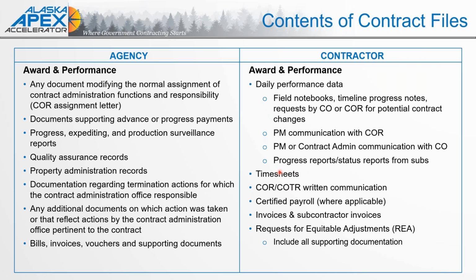Timesheets, especially in the world of construction where you need those certified timesheets, that certified payroll. Of course, any written communication from that representative, invoices, subcontractor invoices, and of course, any requests for equitable adjustment, and make sure that you have all of the supporting documentation, price verification, cost supporting documentation as well.